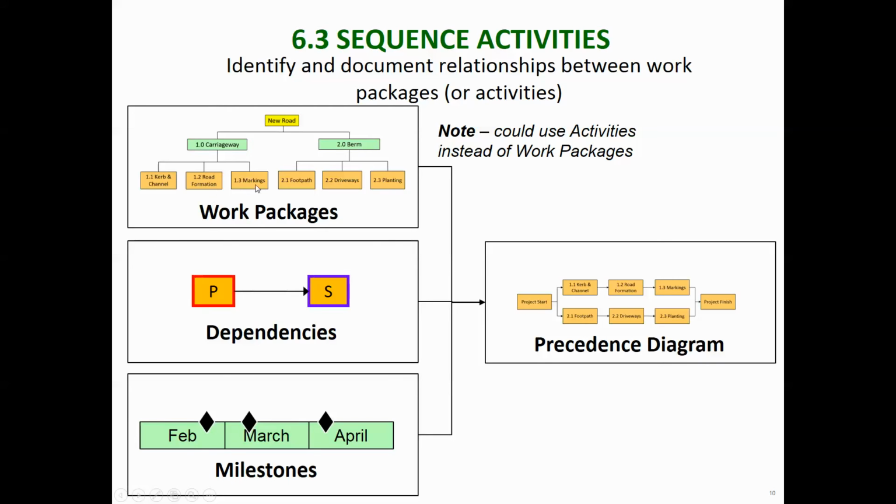There might be one of these work packages that you haven't done before, you don't really have experience in, so you might break that down into activities to give yourself an accurate sequencing, but also for determining the resources and determining the duration. So you can mix the work packages and activities up. But in this case we've just got the work packages.